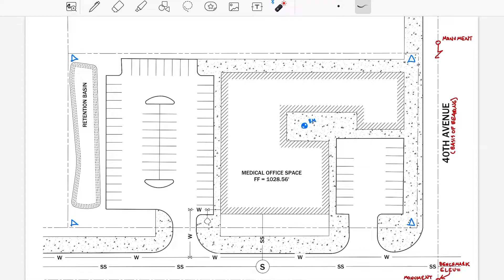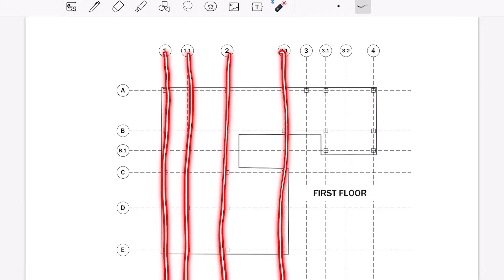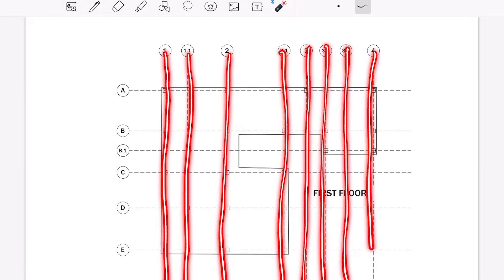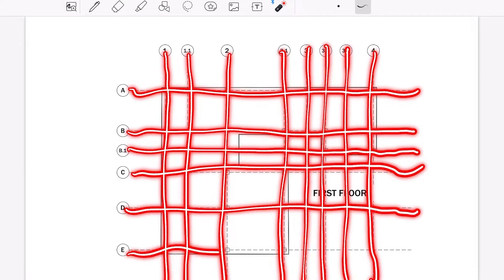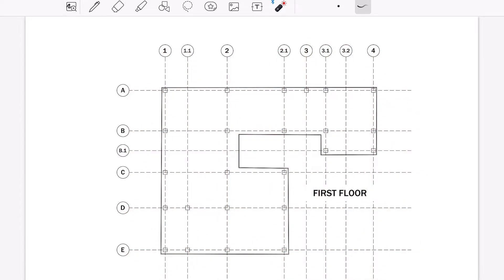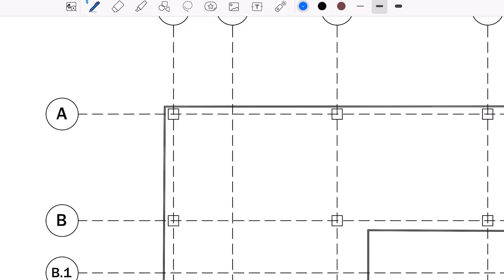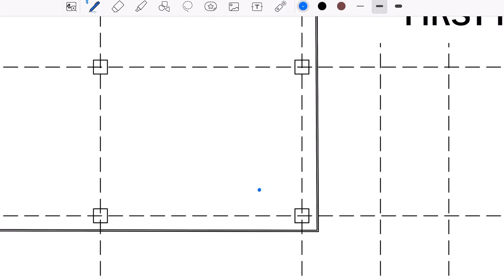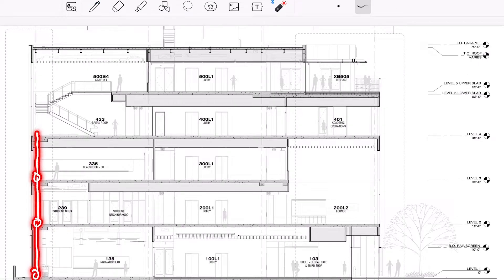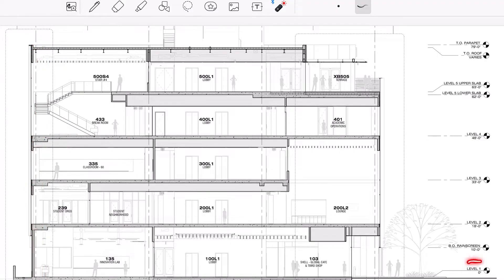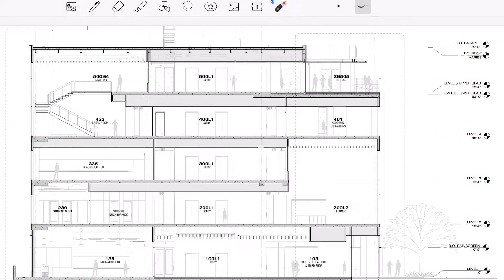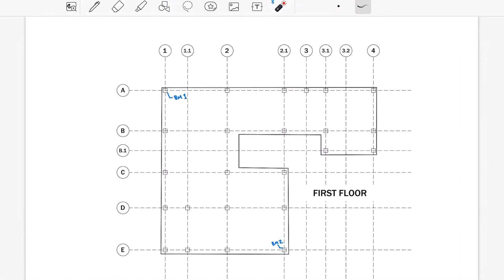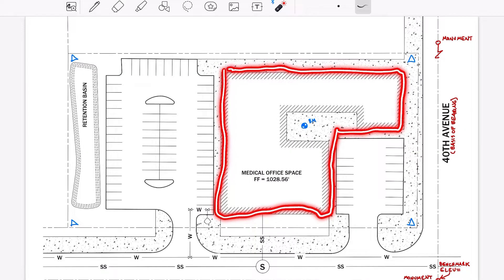Tasks included in the building package are generally the layout of items found in the architectural plan set, such as building grid lines, important grid line intersections, vertical benchmarks set within the building walls, and the transfer of grid lines and benchmarks from floor to floor to assist in location and verification as the building is constructed vertically. In other words, everything inside the building envelope is in the building package.